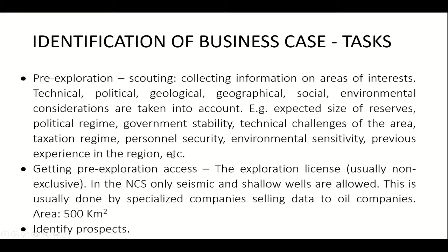Then after this phase, the pre-exploration and scouting, even parallel to that, there is an option to get pre-exploration access. It means that you need to get more information about the area, and it was not enough with the information that was available to take a decision to determine if there is an interesting prospect there. So you can apply; usually countries have exploration licenses, and these are usually non-exclusive. There might be others in the same area conducting exploration.